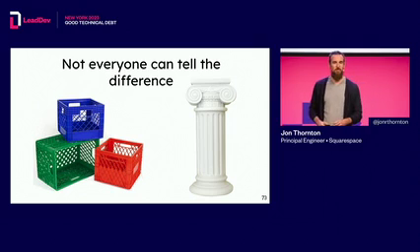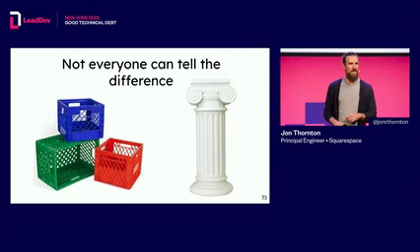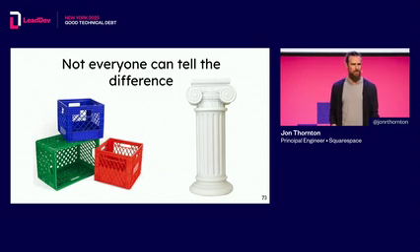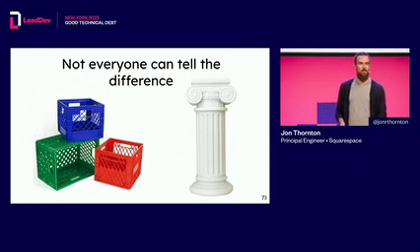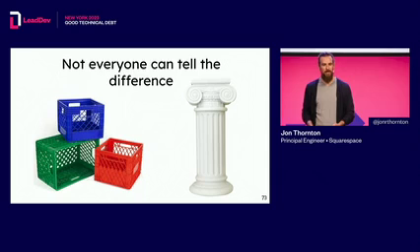Repeating yourself is key because stakeholders tend to be a little forgetful when it comes to tech debt. Those of you who've been managers are probably familiar with the idea that you need to repeat something at least 3 times for people to actually hear it, and this totally applies here. If a non-technical teammate or a stakeholder sees the email editor successfully sending an email, they might very understandably think that we've already built it and we can move on to the next thing. And this miscommunication and the surprise that it creates the next time the team does planning is one way for good tech debt to turn into bad debt.